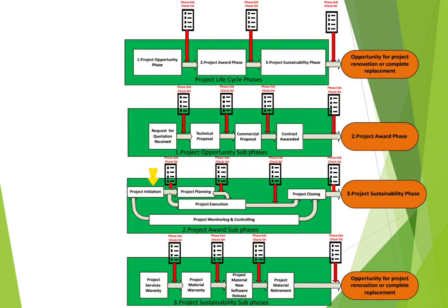So during the project initiation phase now, you need to start the internal kickoff meeting. You need to review your contract with all internal stakeholders inside your company. You need to invite your finance team, your sales team, the tender team, the technical lead that will be assigned for this project, the project controller or project control team. All need to be in this meeting where the facilitator, account administrator should prepare the initial minutes of meeting.